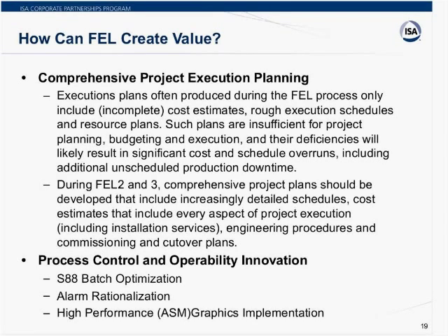on that. And when we think about who's going to do what, who's going to do the graphics, who's going to do the installation, who's going to supervise the commissioning, those kinds of things have been thought out in advance, so that you're not figuring that out halfway through the project, which, as Nick talked about, will likely cost you more to figure it out later. And so the main point there is in FEL 2 and 3, comprehensive plans should be put together that will save money in the long run. It might require you to spend a little bit more time and money up front, but it will more than pay for itself in the long run.